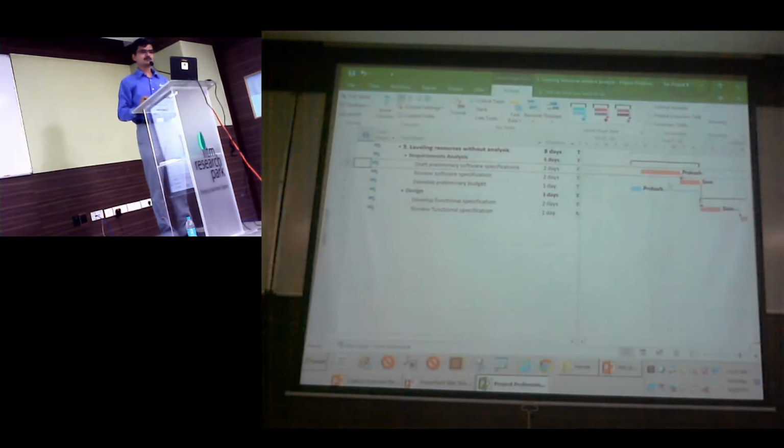What do you see now? Now my critical path is taking much longer, maybe 1 day more. And naturally it is affecting your overall project duration. You might have a restriction that your critical path should not be affected in any case. Okay? The way you can achieve it is, you don't have control over slack, but you can always prioritize your task. So we have a column available called priority.